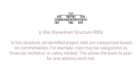Another key tool used to identify risks is Risk Breakdown Structure (RBS). In this structure, all identified project risks are categorized based on commonalities. For example, risks may be categorized as financial, technical, or safety-related. This allows the team to plan for and address each risk.